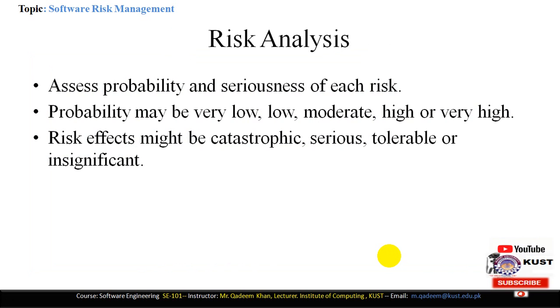In the risk analysis, we define the probability and seriousness of each risk. Probability and seriousness of each risk is in fact achieved through our experience. If a particular risk arose in past projects, then there is also a chance that this risk will occur again, and also the effect of the risk will be the same as it was in the past projects. Probability may be very low, low, moderate, high, or very high.